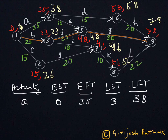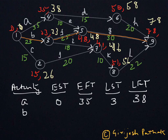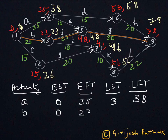Now for activity B: to find the Earliest Start Time we look at the node where activity B starts, which is node 1, so the Earliest Start Time is 0. To find the Earliest Finish Time, we add the activity time to the Earliest Start Time. Activity B has a duration of 23 days, so 0 plus 23 gives an Earliest Finish Time of 23.